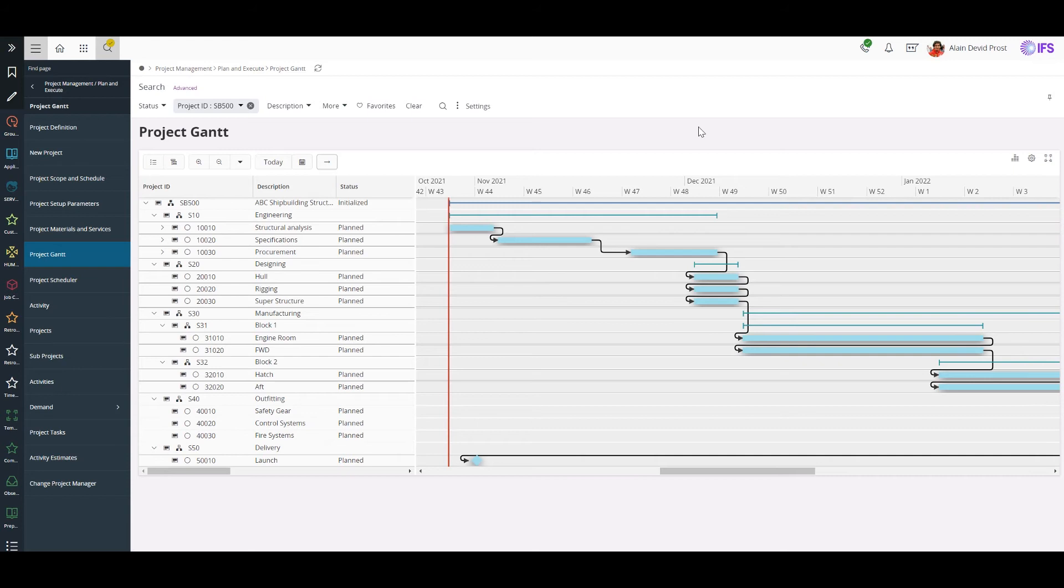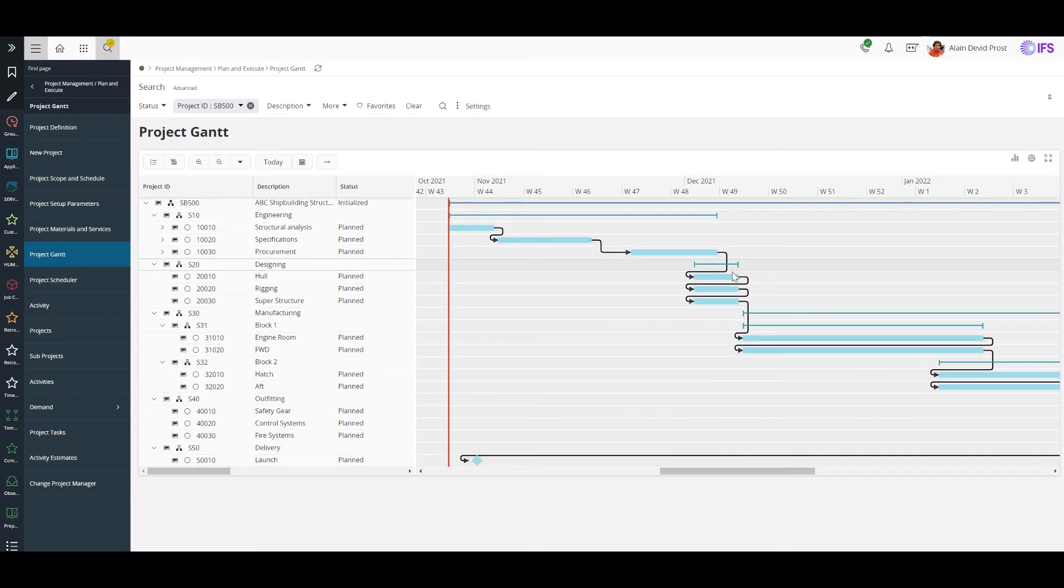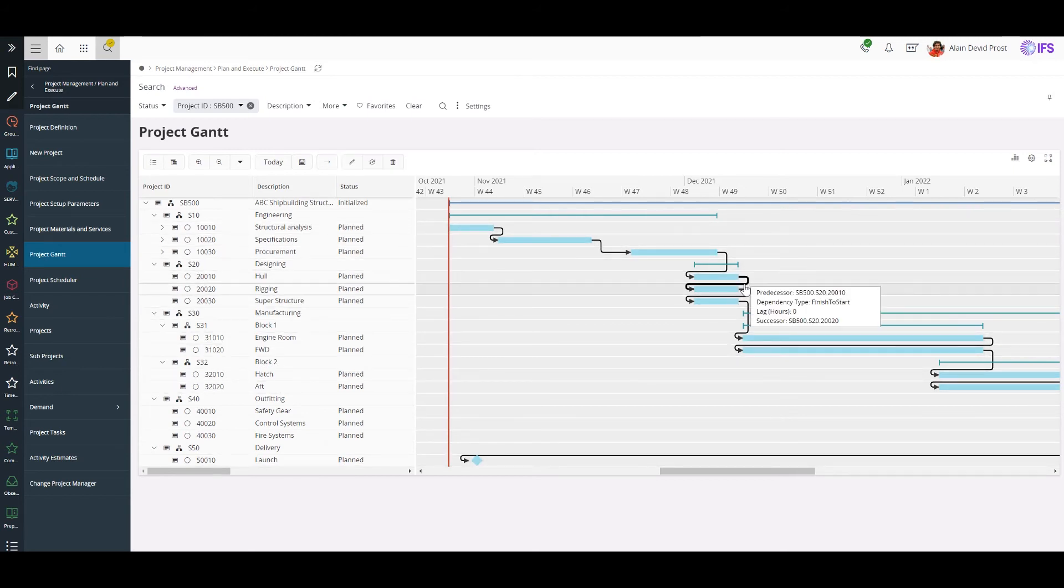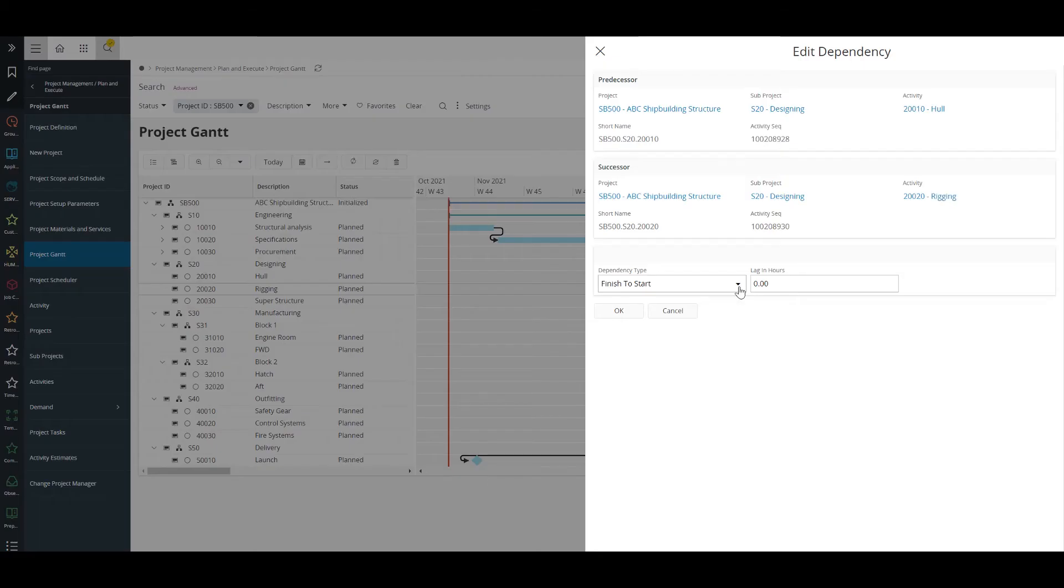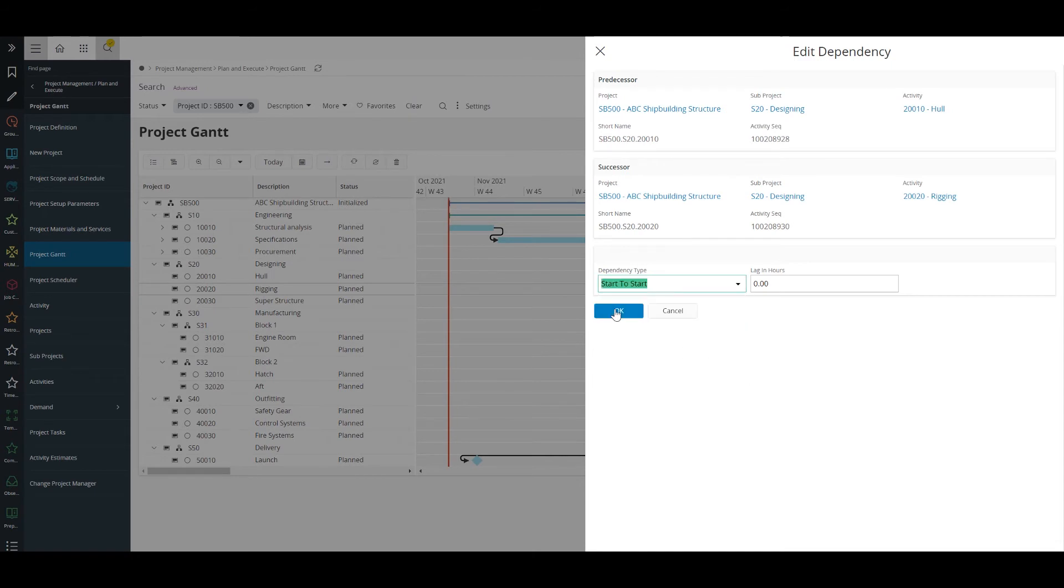I just noticed that designing of hull and rigging can be done parallelly not sequentially. So I'll change the dependency type between hull and rigging as start to start.